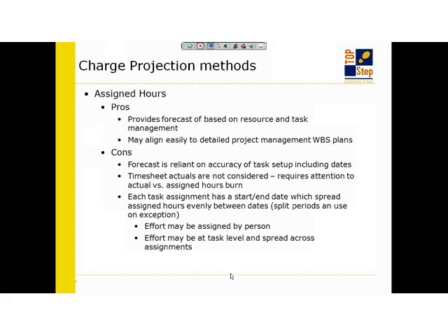OpenAir will say, oh, it's 25 hours a week. But they decide that they're going to really work hard the first 2 weeks, and they work all 100 hours in 2 weeks, and they work nothing the other 2 weeks. So depending on where those weeks fall, it could be all in 1 month. It could be a split between 2 months. You don't have control to say, well, that person is going to do it more up front, and less later on.